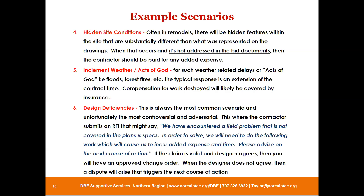Hidden site conditions are a classic for remodels. You go to do a job walk in a building and nobody opens up the walls. When you win the project, all you can bid on is what is shown — what's in black and white. If it's not on the drawings and not covered in the specs, it's not your responsibility. If it's not in the documents, it's not yours. So it's important that anything a contractor finds in hidden site conditions gets documented.